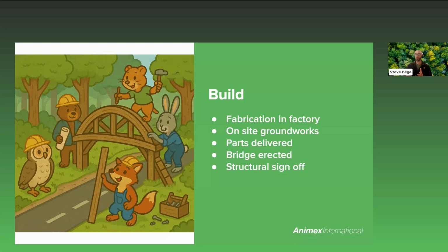Now, typical fabrication costs per metre of a bridge within the UK vary depending on the material choice, the distance, the style or number of required supports that structure may have. So good budgetary costs to consider range between around £500 for potential stainless steel rope structures, which I'll talk about more later, up to around £1,500 for solid steel. But with aluminium sitting in the middle range of that, which is the most common structure we've designed and installed in recent years, at around £1,000 per metre.